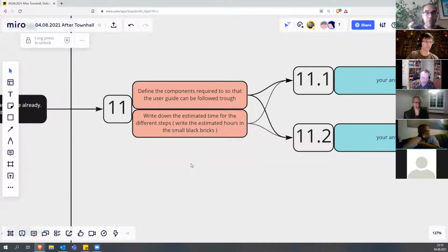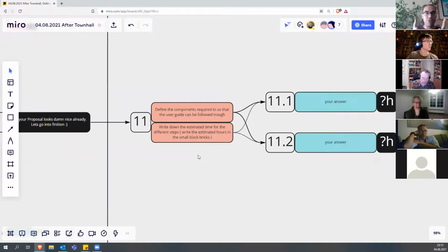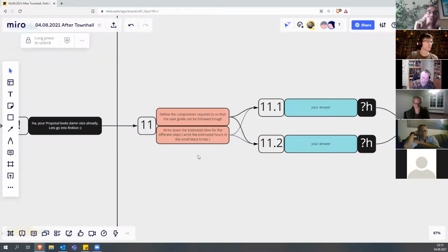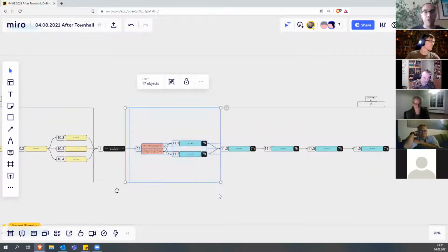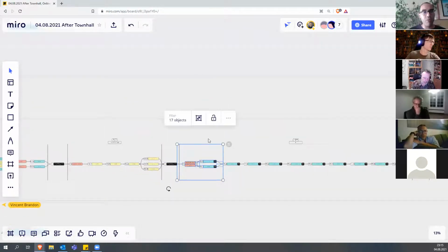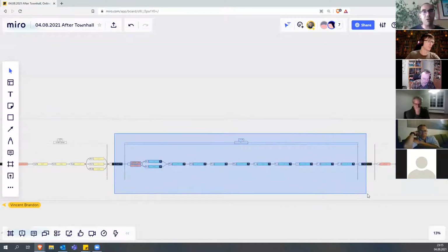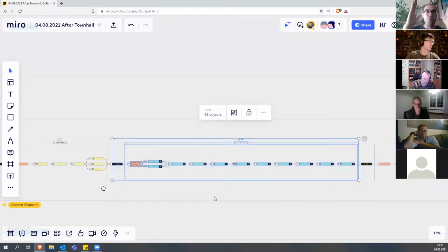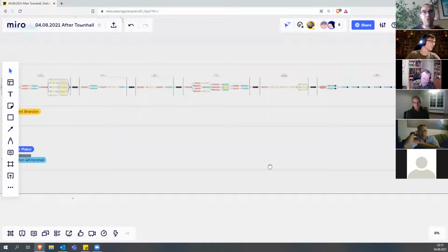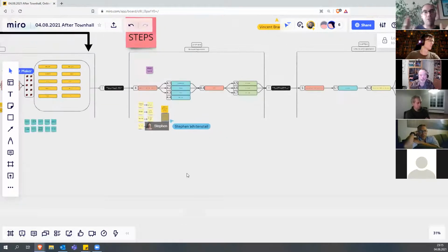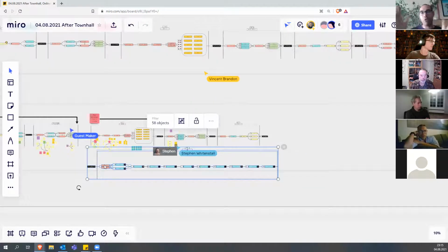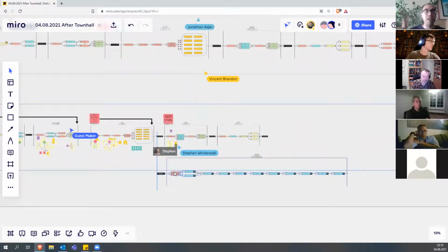So specifically to number 4, I would say that it might be good to follow the work breakdown structure, and then to connect those work breakdown tasks to people once the work breakdown is proven to be within scope of the proposal that you're thinking about, right? So if the work that we think we need for this project can be done in a reasonable amount of hours, and we can go out on the line and actually find wages, we can actually do this.